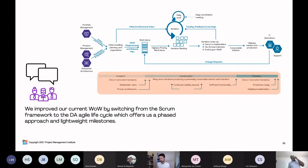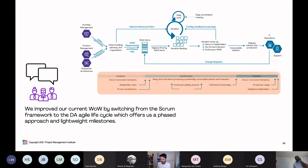The DA Agile lifecycle also offers milestones below the phases. A milestone like 'proven architecture' means that when you start building what you're building — say a new iPhone application — you want to prove as soon as possible that the way you're building it, you can actually do it with the tools you have. By proving that as early as possible, you avoid surprises towards the end where you discover a tool isn't working and you're not ready to release. You want to prove the architecture early to lower risk and have fewer surprises.